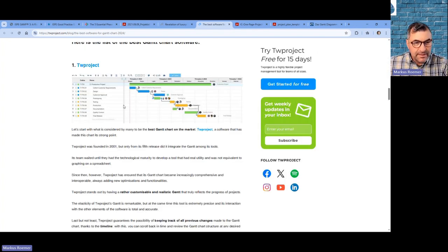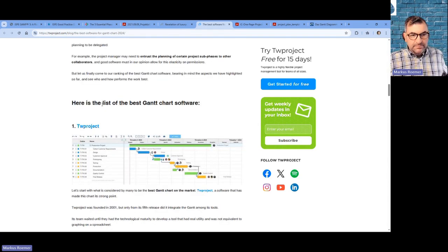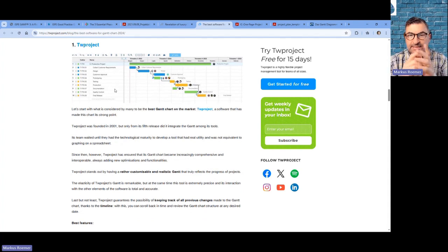They typically show me a Gantt diagram. You see here also a website, the 10 best project schedule applications, something like this. This is not a project plan. This is the project schedule. First, in the initial phase, you have a project charter, a one-pager. This is where we want to go. Then you create a project plan. It's very similar to a validation plan. That's the reason why I try to bring them together. And this here is a project schedule. And this is not a project plan.